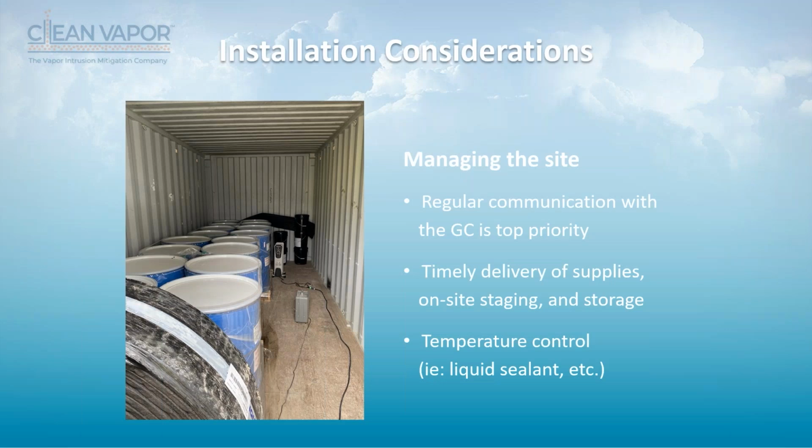Other things you want to do is think about installation considerations, managing the site. You want to talk to the GC ahead of time. You want to figure out how the site is being sequenced, where you can store things, time of delivery, getting back to speed of construction.